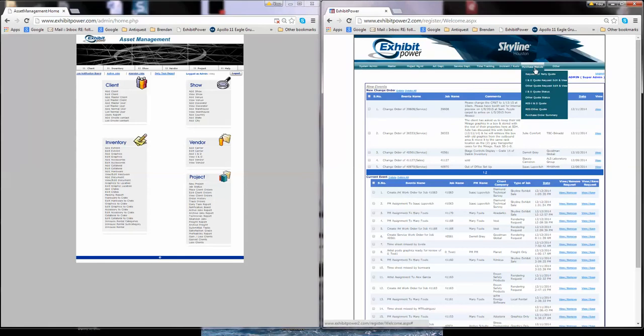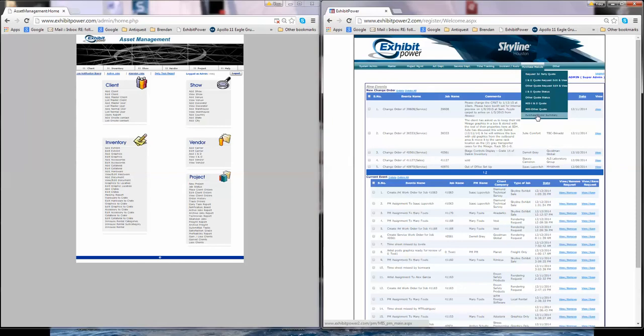The purchasing module is very powerful. This is where we can request quotes from third-party vendors, and we can manage the quote status. We can convert these quotes to purchase orders. All the information from the entire system, whether it's time, usage charges from the shop, purchase orders, other purchases, everything gets tracked to the purchase order summary, where we can see the profitability of the job.